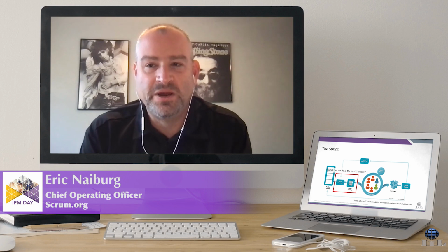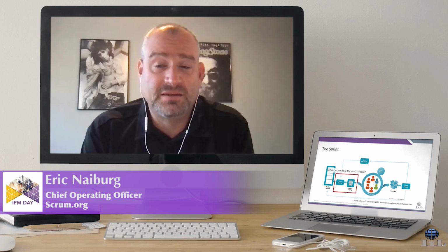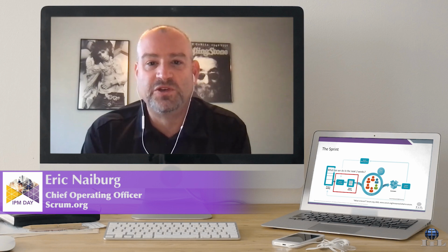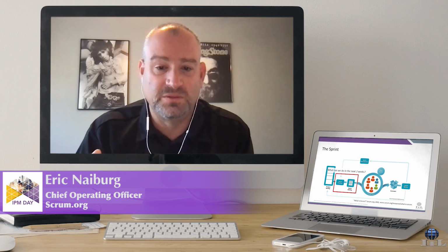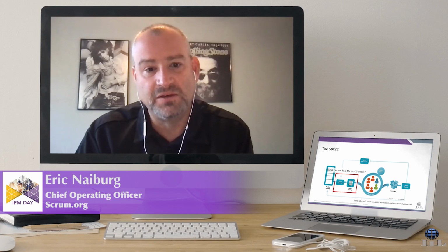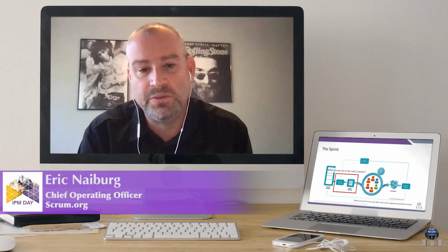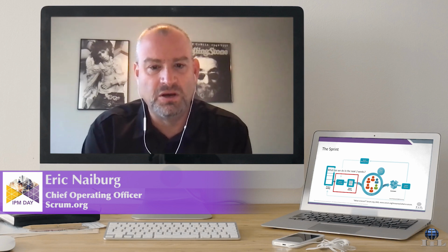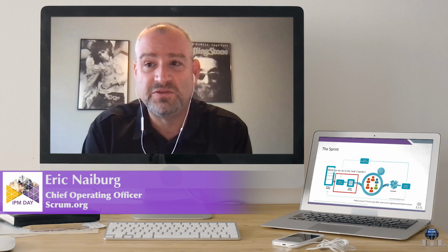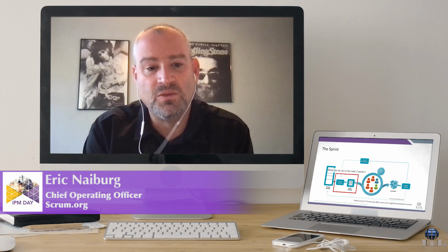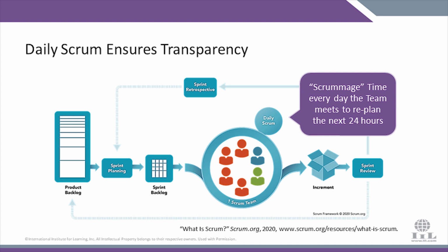One of the myths that I hear quite often is, coming out of sprint planning, I have a complete sprint backlog. That's not necessarily true. As a matter of fact, if you do, you've probably scoped too much and you're not going to achieve it. All we need is enough to get started, maybe for a few days. Because as we start building, as we go through the process, we're going to learn and evolve. And we can pull more work in as we learn and evolve, focused on that sprint goal rather than trying to fill it all up and then feeling like we didn't achieve what we set out to achieve and losing focus of that sprint goal. And also losing focus of empiricism, losing focus of the ability to inspect and adapt, the ability to get that feedback all along the way and make changes as we move forward.